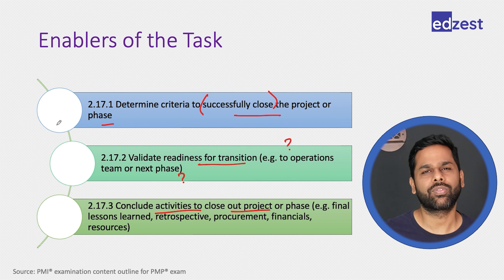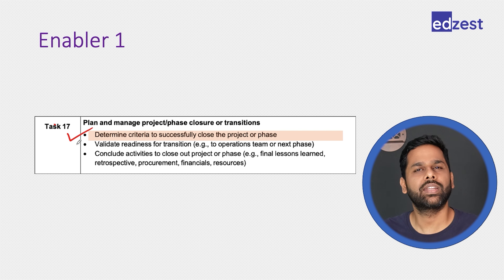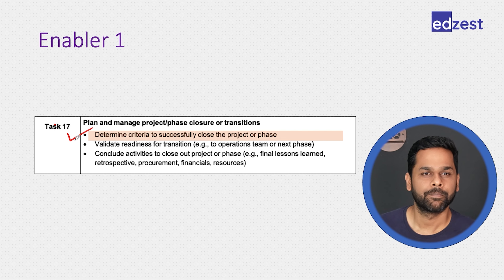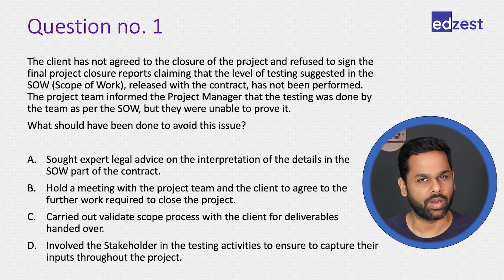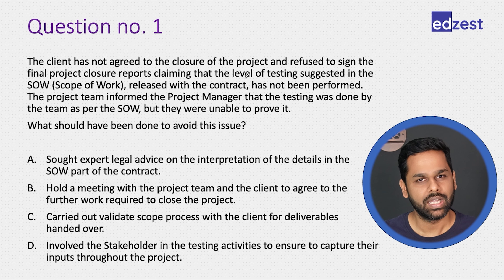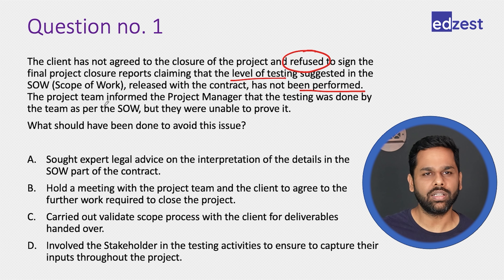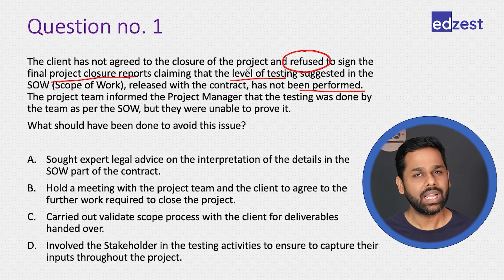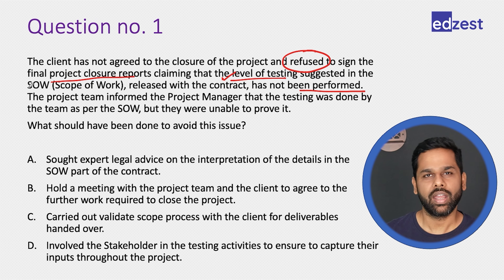Let us see what type of questions can be framed starting with task number one — determining criteria to successfully close the project. The client has not agreed to the closure of the project and refused to sign the final project closure report, claiming that the level of testing suggested in the scope of work released with the contract has not been performed. The client has refused to sign, saying testing was not done as per the level suggested in the SOW.